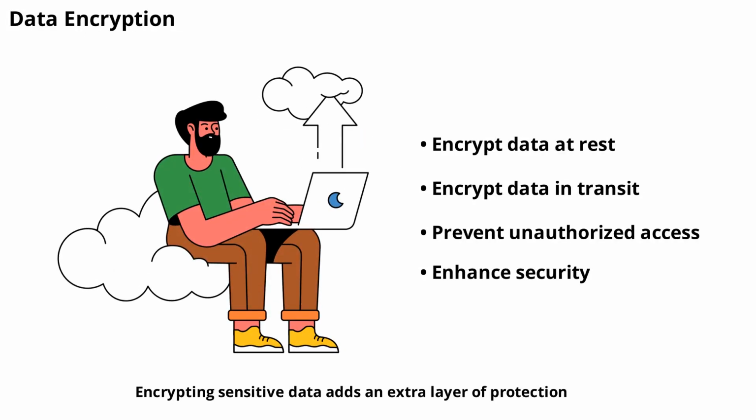Encrypting sensitive data adds an extra layer of protection. This phase, lasting 2 to 3 weeks, involves implementing encryption for data at rest and in transit. Encryption helps prevent unauthorized access, even if data is intercepted or stolen.